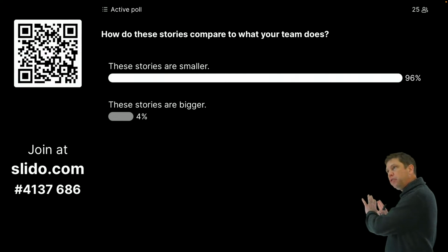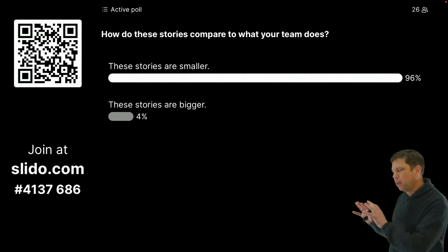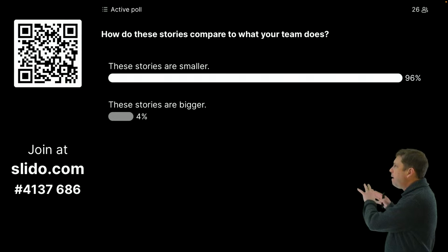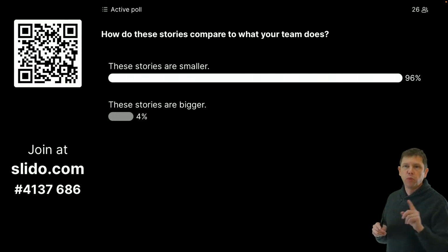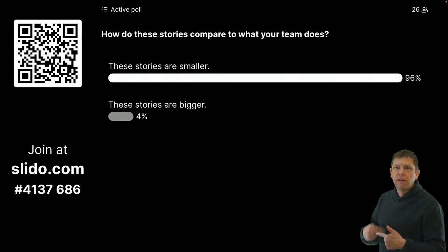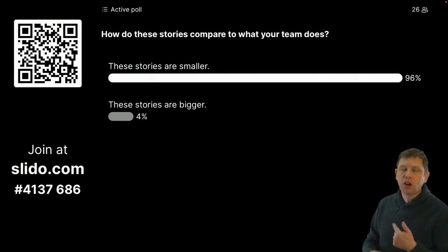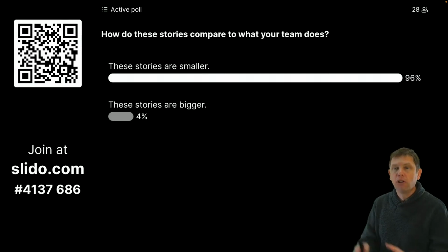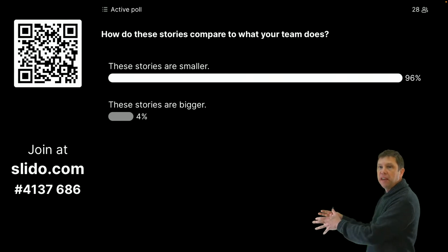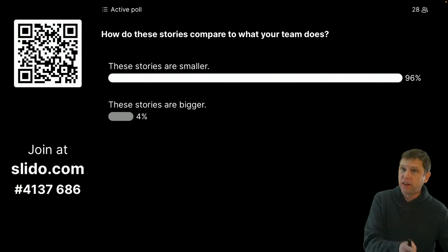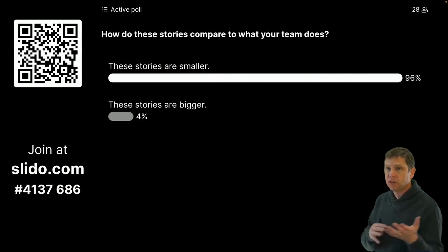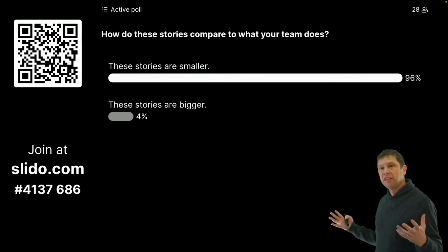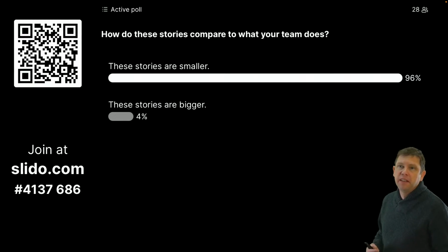And these stories that you see, the other issue with the culture on it is, by making the stories really, really small, I'm creating an environment where I have to continually talk to the user and the customer, right? I've got something, it may take me a few hours, I get it done, we show it to the customer, they say it's good, maybe give us feedback, we change it. Once it's ready to go, we move on to the next one. If I'm working in batches of things that are 2 weeks, I may try to be, as a developer, heads down for 2 weeks before I talk to the customer again, which isn't what we want.